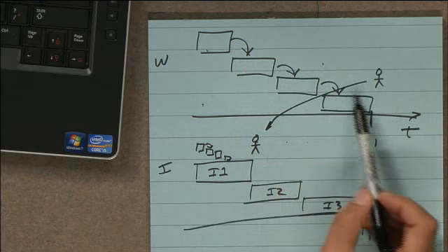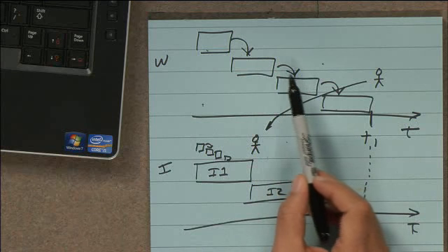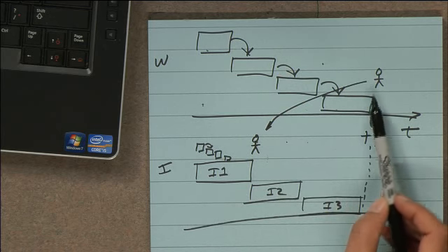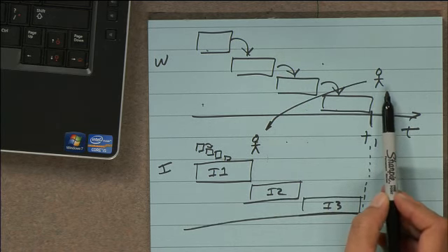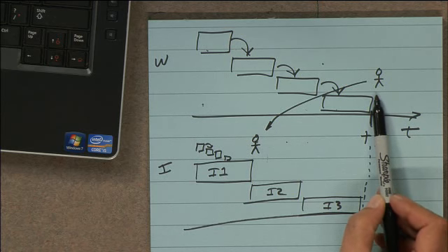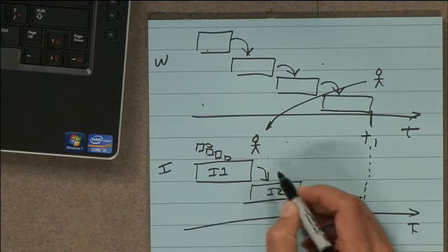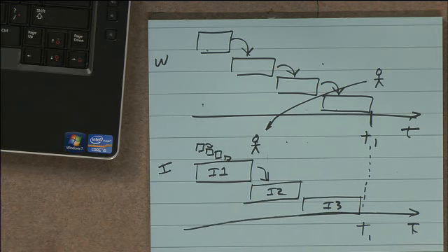If my process was really bad and I had buggy code or the user interface was really, really bad, when does a user get a chance to comment on it? Way out here, right? At this point in time, what possible recourse do they have? Well, not much. The project's pretty much done. But over here, if the customer doesn't like the interface or the quality is suffering, I get a chance to roll some improvements and changes into increment 2 and fix it earlier, rather than, hey, maybe next project. I can do that right away, okay?